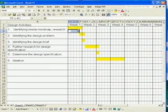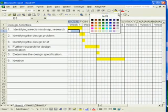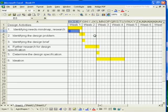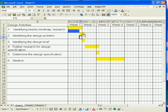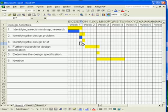Every now and then, you are required to update the project schedule with the actual duration taken to complete each task. Use the same steps that are used to indicate the planned duration of the schedule. The only difference is the color used.